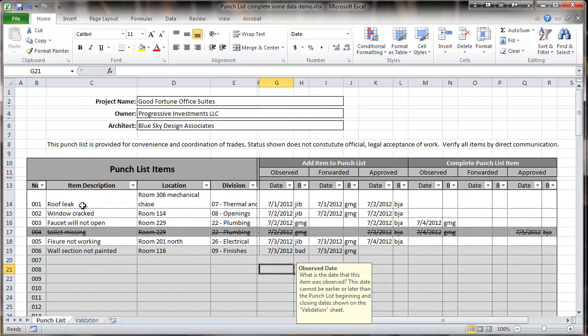There's a place for a project owner and architect, item descriptions, locations, a section for specification division the work is in, and then a flexible series of options for adding items to the punch list or removing them.